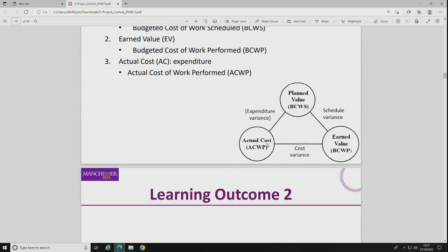So this is what I've basically been outlining to you. Earned value uses the performance measurement baseline, which is the plan you've developed with activities, resources, durations, and it has these three cornerstones. It has this actual cost in your finance system, sometimes termed accruals. This is sometimes wrongly understood by some people in industry as classical cost engineering, where you've got people who are monitoring accruals, how much money is being spent, and inputting that data into finance systems like ERP systems.